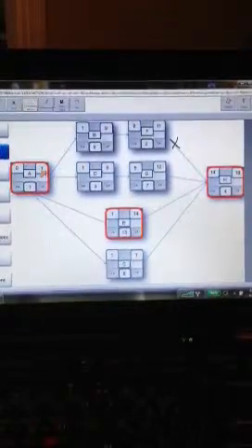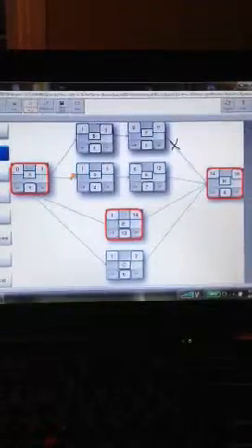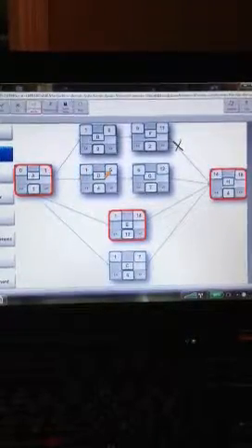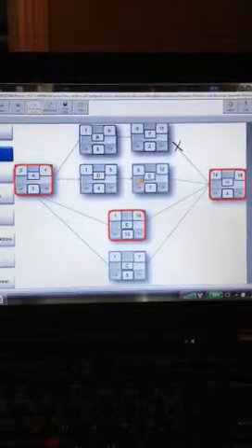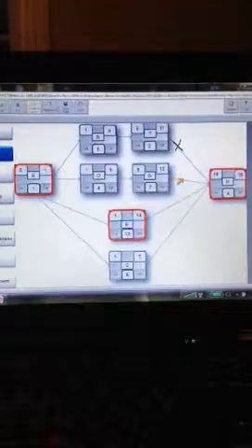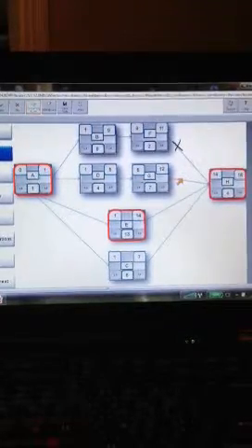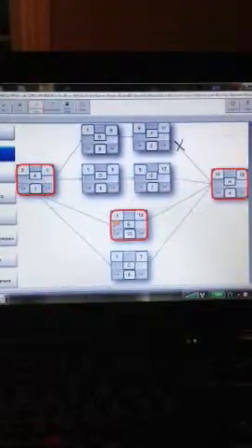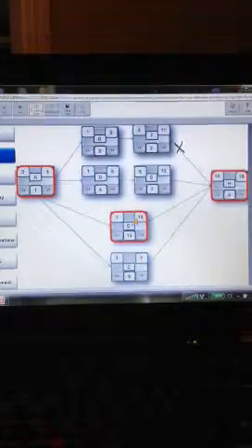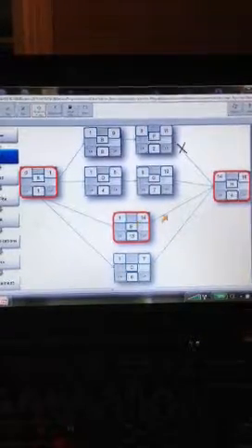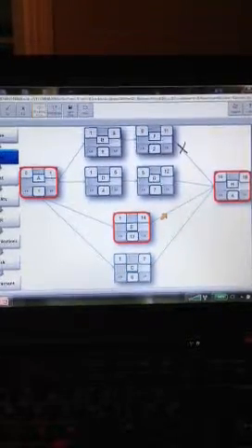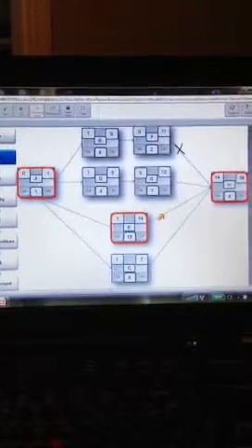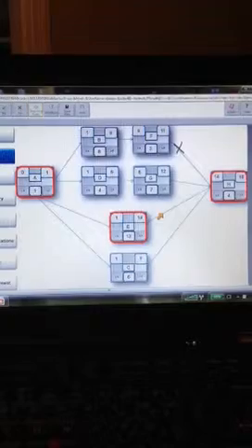So we've got the earliest that you can finish activity A diverging into D, so you carry the 1. Plus 4 gives you 5, carry the 5, plus 7 gives you 12, and stop, for the exact same reason. Now we're going to come down here. We're going to say 0, 1, and 1. 1 plus 13 gives you 14 on the E activity. And we still stop and then take a look at C, and we're like, oh, no. 1 plus 6 is 7. That's far less than 14. 14 is the biggest number.